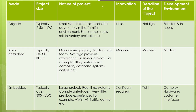The first step is to find which category a particular software product belongs to — organic mode, semi-detached mode, or embedded mode. A development project can be considered of organic type if the project deals with developing a well-understood application program, the size of the development team is reasonably small, and the team members are experienced in developing similar types of projects.